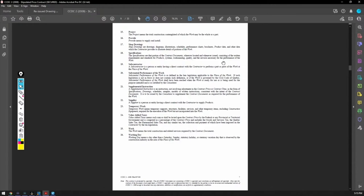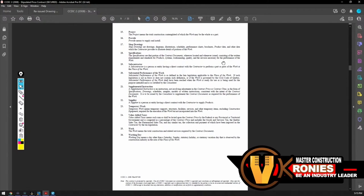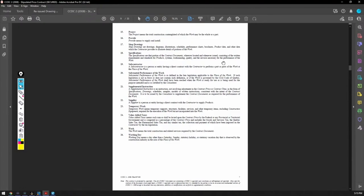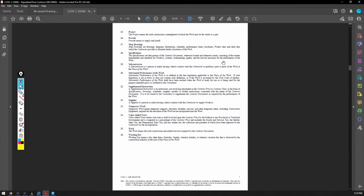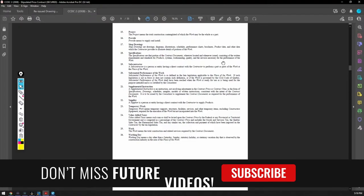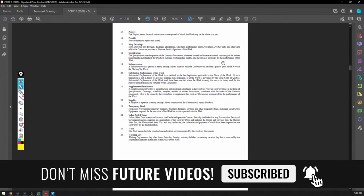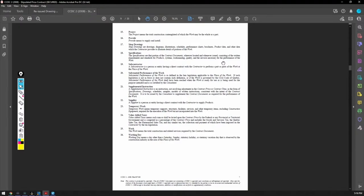Now, this is how it goes. Contract trumps specifications. Specifications trump drawings. Now, on the drawings itself, the details will trump anything. So if you've got something on a floor plan or a section that you don't understand, it's going to go floor plans, section details, and then details. Those are like, if there's any dispute, contract first, then the specifications.